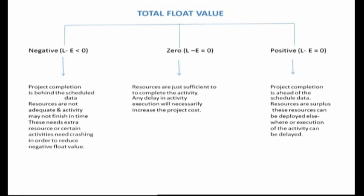When we have a zero float value, it means that resources are just exactly sufficient to complete the activity. Any delay in any activity execution will necessarily increase the project cost. When we have a positive float value, which is when L minus E is greater than zero, it means that the project completion is ahead of the schedule date.